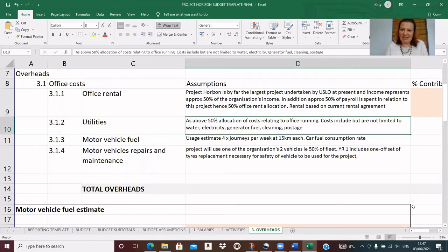But what I want to emphasize is that you keep that description quite generic so that you're not constraining yourselves to the type of costs that can be charged there. Because if we limit ourselves and then an auditor sees something like, in this case, a health and safety cost that they think wasn't budgeted for, we can raise questions. So be generic and be transparent.